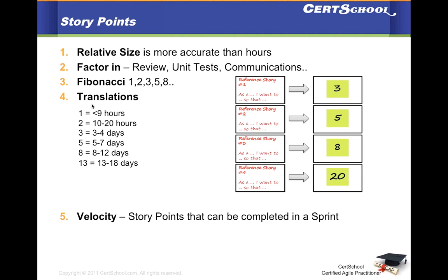So that remaining time has to be a tangible absolute figure. Even though you're doing estimation based on unitless story points, any tool that is trying to plot the burn down would need an absolute time.